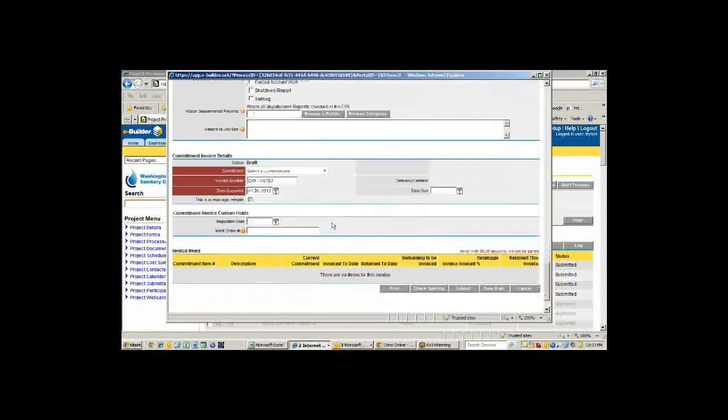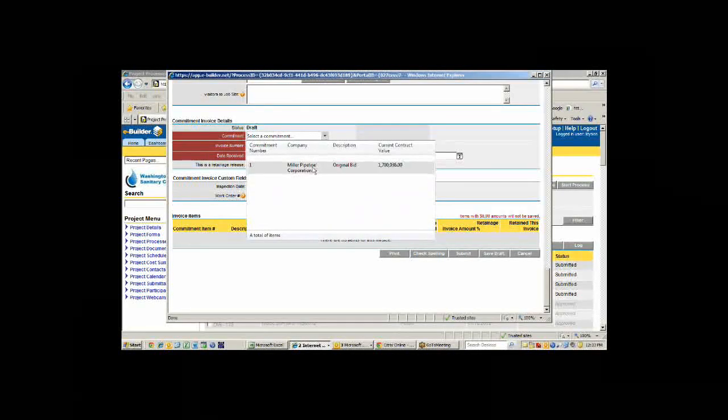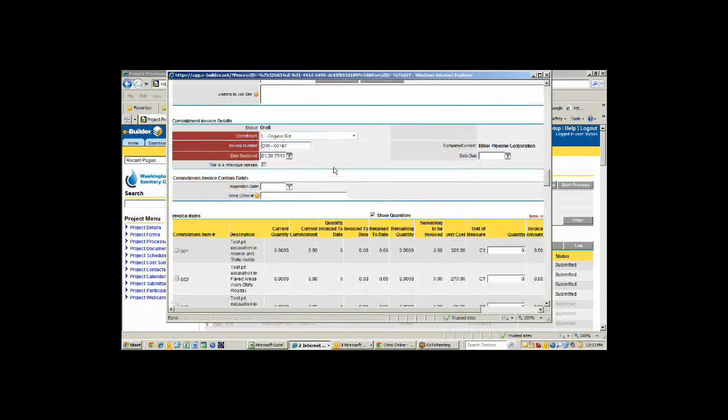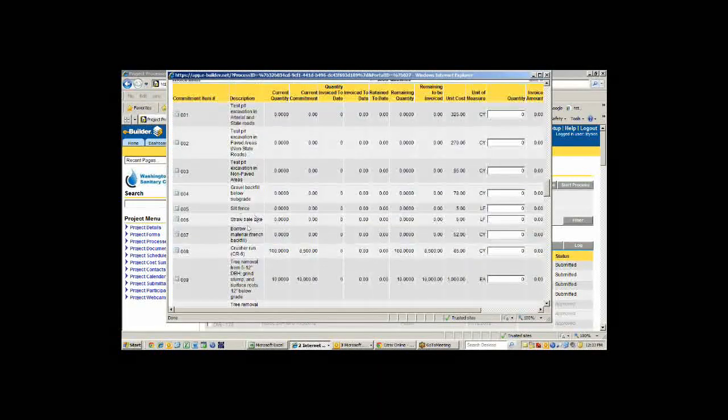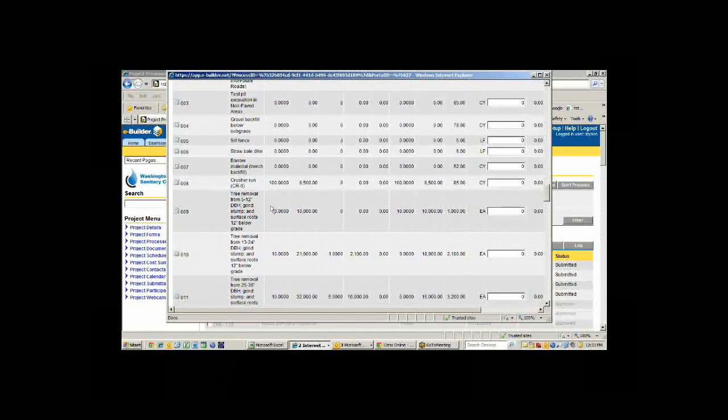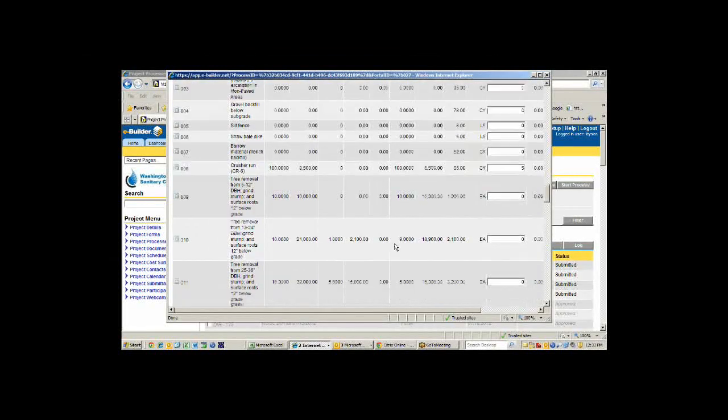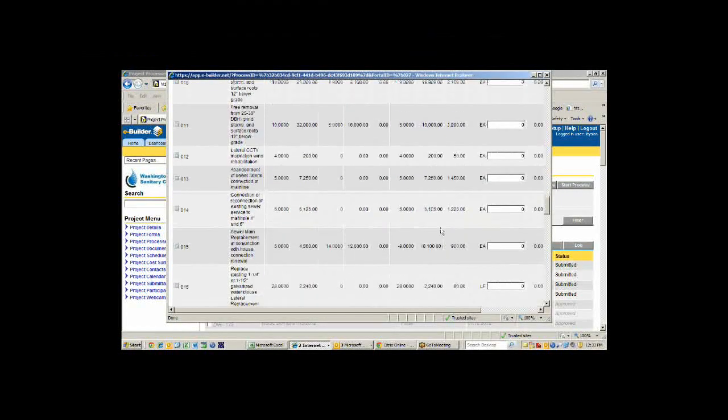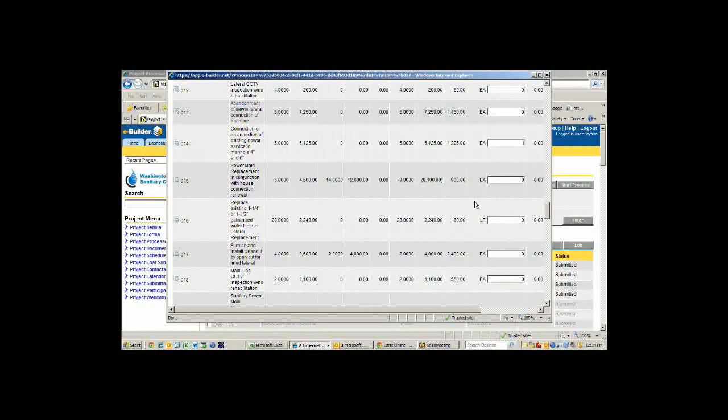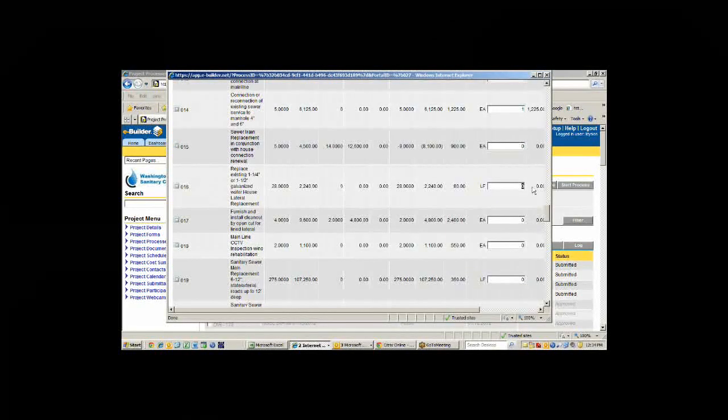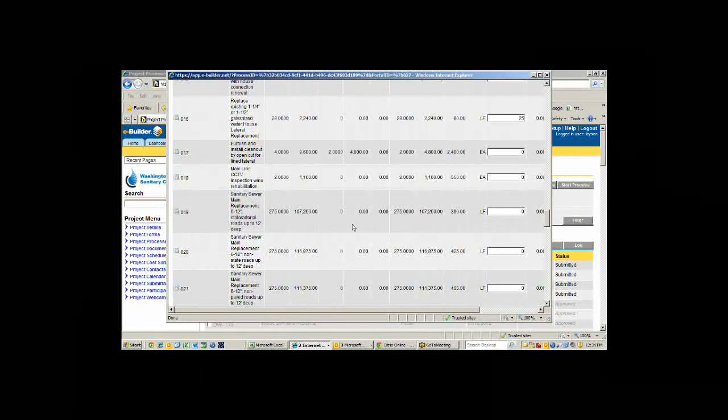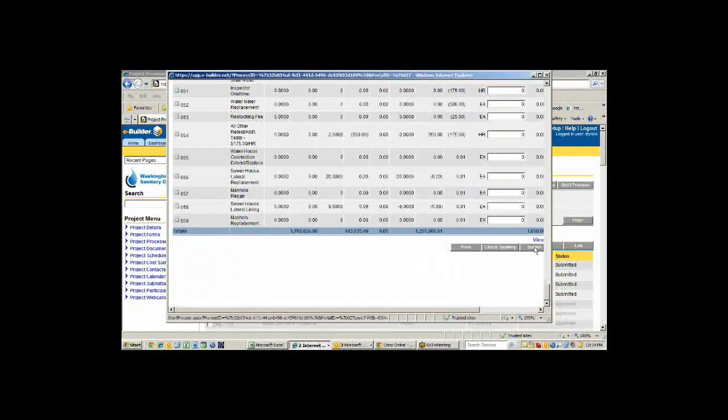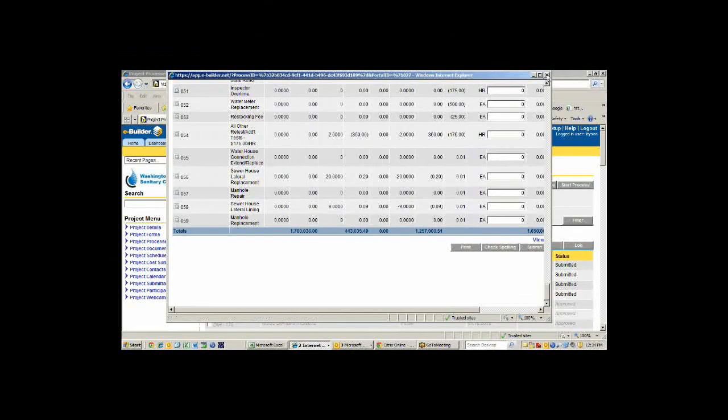Down here at the bottom, this is where we get into tracking what the costs are. They would select a commitment for this particular job, which is just what the bid sheet looks like. It lists every item that's in the bid. You can see here we've got test pits, gravel. In this particular case maybe they're working on a lateral and they need to enter they put in five cubic yards of crush and run, they did a reconnection of a sewer service from a manhole, and they put in 25 feet of lateral galvanized water with copper.